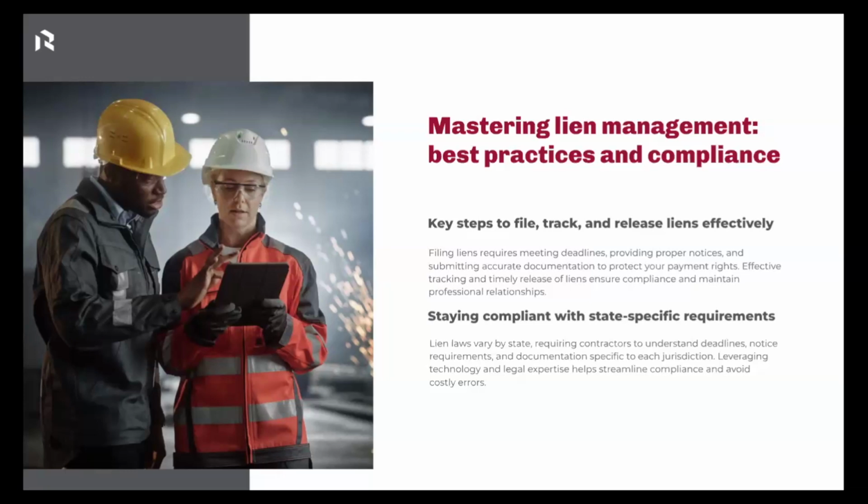So the last thing I want to talk about here in mastering lien waiver management is making sure that you understand how your lien waivers and your release forms interact with each other. A lot of times we have waivers that are going to supersede others. We know that a later waiver is going to override all of your prior ones, with the latest through date.